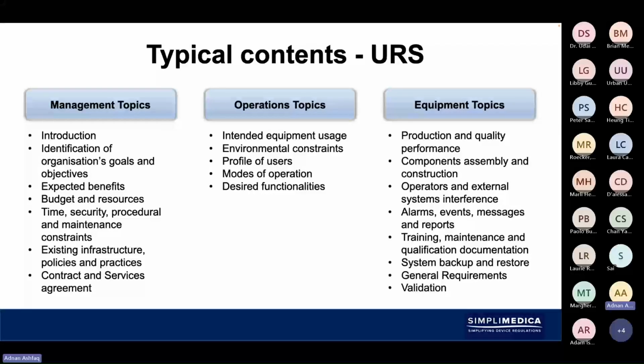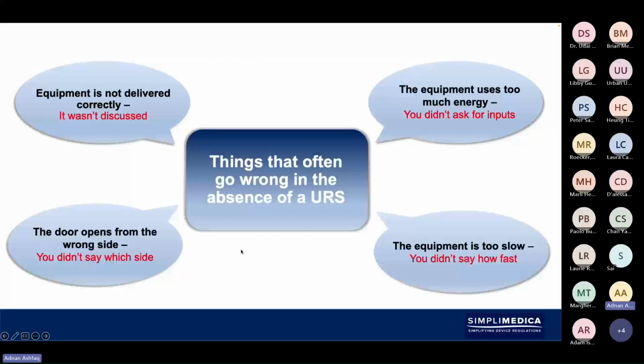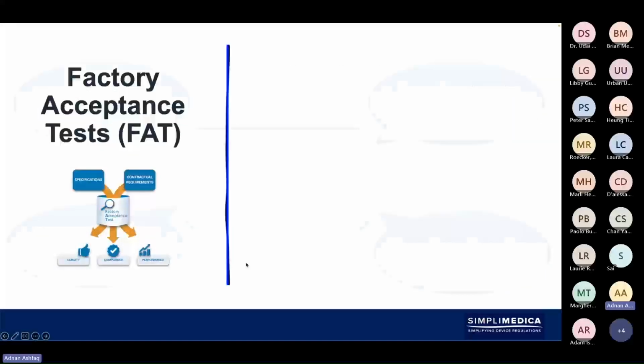And sometimes the user requirement specification ends up being a communication between the customer and the supplier. That might even be emails. So there may even be a phone call conversation, but the minimum that we can go off is any documented records, and that might be an email which gives us some evidence of what was being requested at the time of purchase. So this is assuming everything's done in the right order.